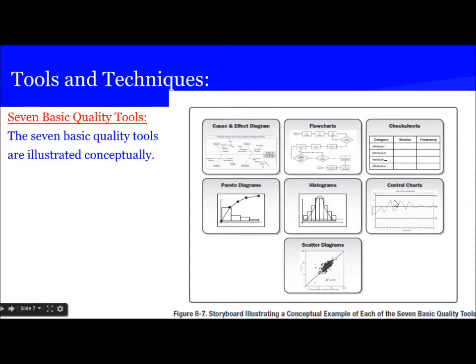So there are two kinds of limits: specification limits and control limits. Based on where our dots are plotted, we decide whether it is out of spec limit or under control, and whether we should try to find the cause. Any dot which goes above the upper control limit or below the lower control limit is an assignable cause, and we need to find the cause in the project.